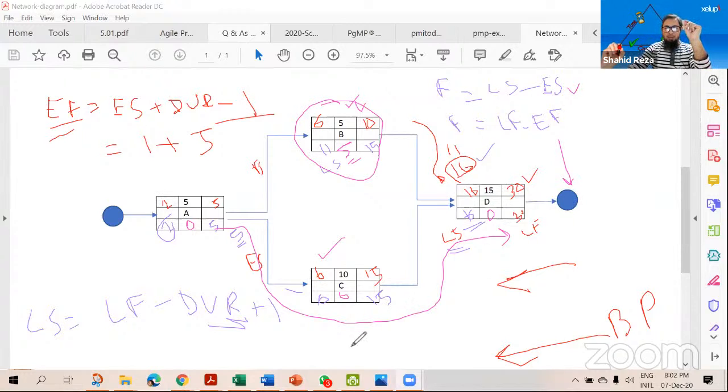But when we are talking about, let me share my white screen. Okay, so can you see my white screen? Yes, I can see. All right. So total float, I think you have understood. It is related to the project finish date. Delaying one task, if it doesn't delay the finish date of the project, then that is actually float for that task. Okay. And it is related to the total network path.